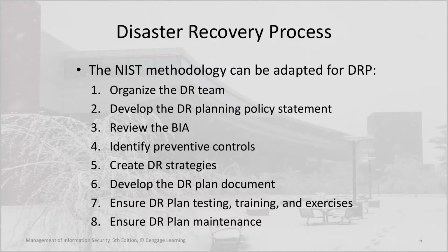The NIST methodology can be adapted for the disaster recovery process. You organize the DR team, develop the DR planning policy statement, review the business impact analysis, identify preventative controls, create DR strategies, develop the DR plan document, ensure DR plan testing, training, and exercises, and ensure DR plan maintenance.